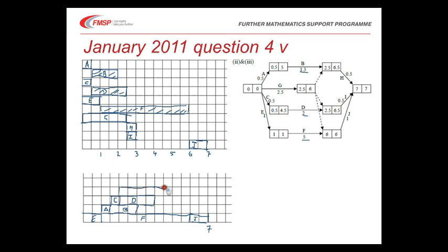which takes 2.5 minutes, followed by H, which takes half a minute, followed by I, and you can see here, once we get down to here, there's nobody doing anything here, and then that person can complete the task for the last 2 minutes.